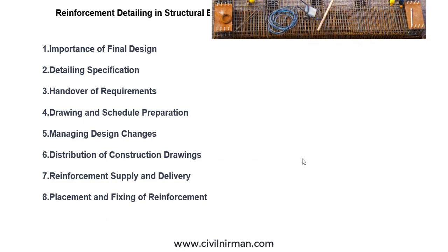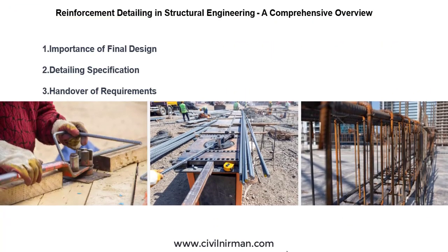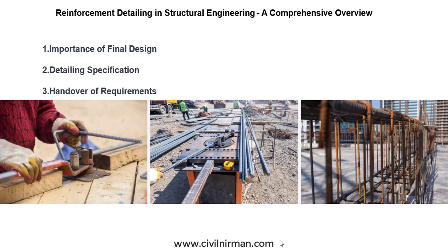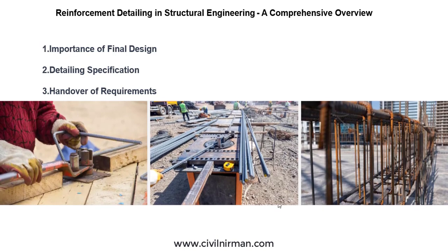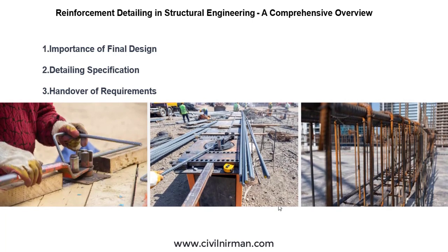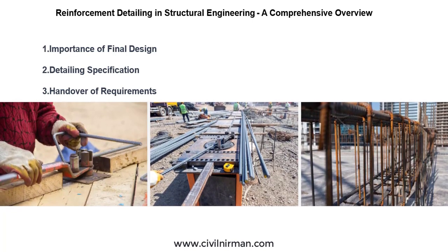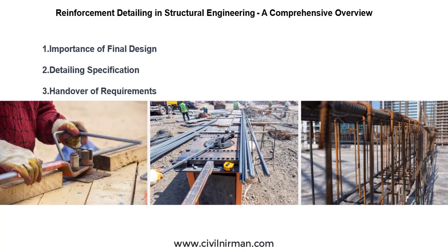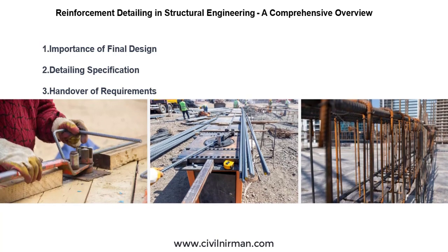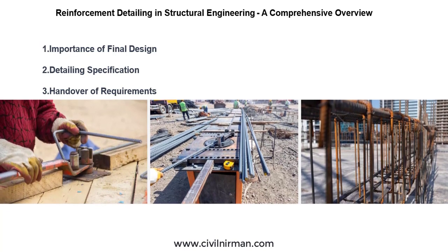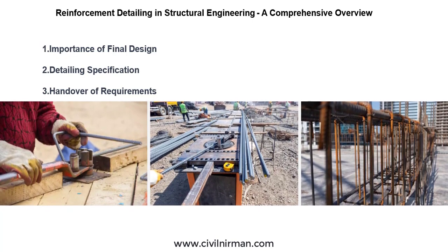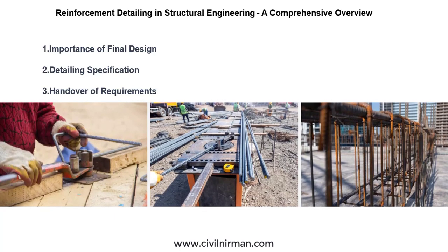Placement and fixing of reinforcement. See, the reinforcement is placed and fixed by the steel fixers, then checked in situ. Responsibility for checking the reinforcement should be covered in the specifications. Formal pre-checking should include checks of the reinforcement, covers, inserts, and special items, etc. The reinforcement should be checked again during the concreting for position, and afterwards dowels and starter bars should be treated or protected. The specification may also require a cover meter survey after concreting.